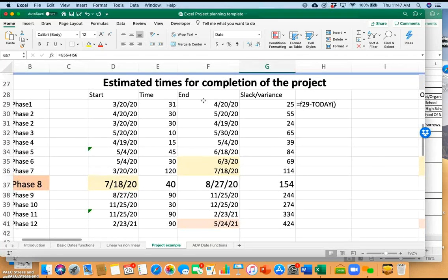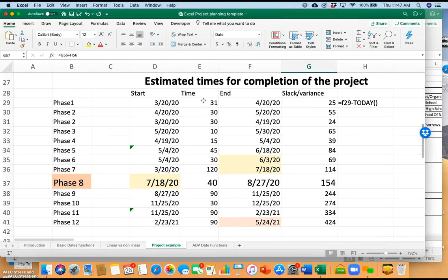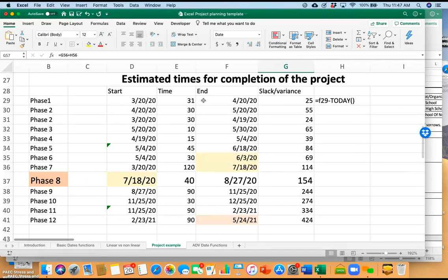But understand here in my second item, I'm not dependent on here, I'm dependent on the first item. Okay, and actually I think there may be an error. No, because these both could start at the same time. They weren't dependent on anything. So that's possible. We might have a step 3 that can be started at the same time as step 1. And you can kind of see how it goes.